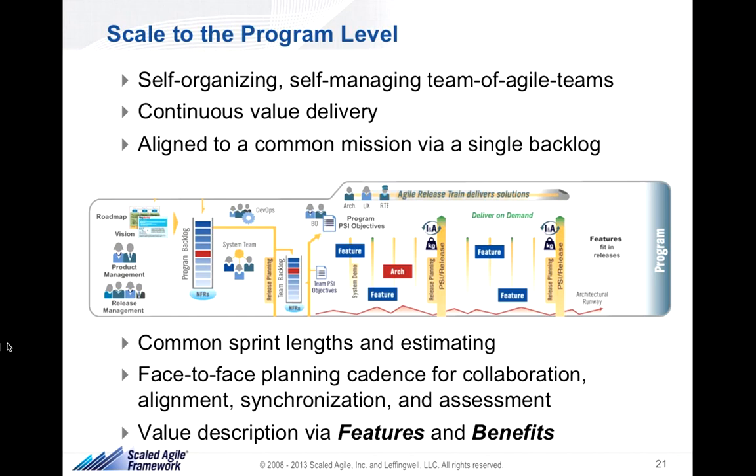And they do that in 2-week sprints based upon a common cadence, and they do that in these larger time boxes that we currently call PSIs, basically program increments, potentially shippable increments. And that larger time box is a strategic time box because enough time has elapsed, enough value has been built that the right types of stakeholders can get involved in that.